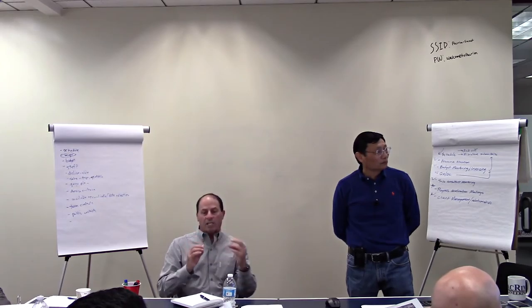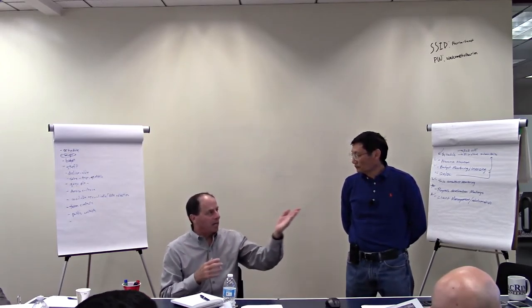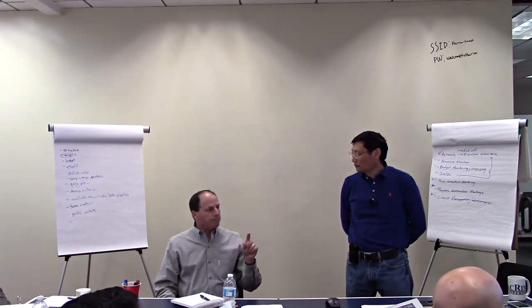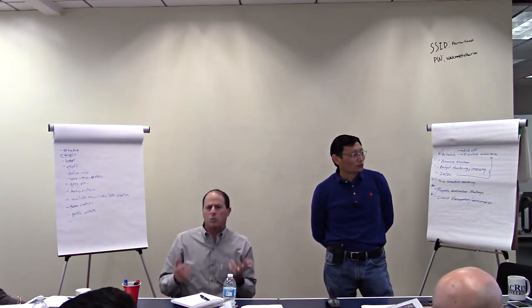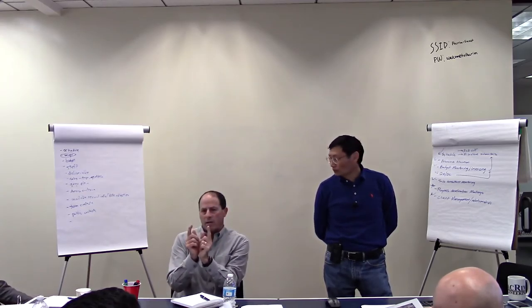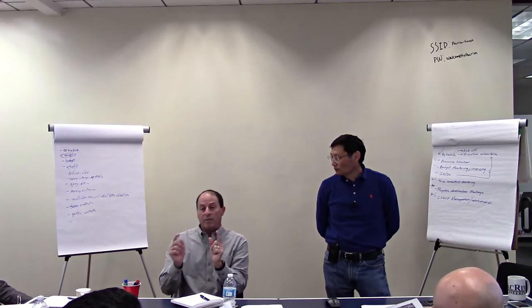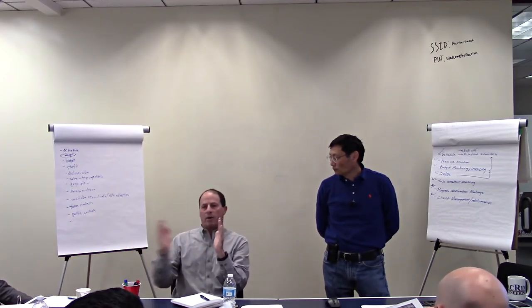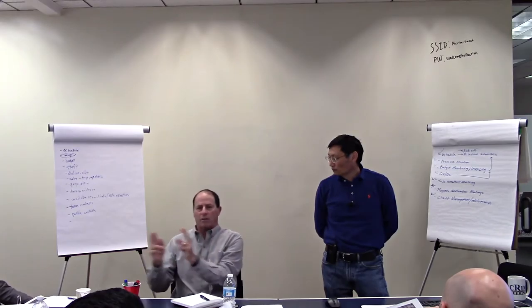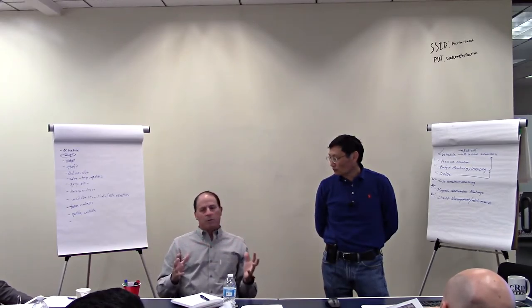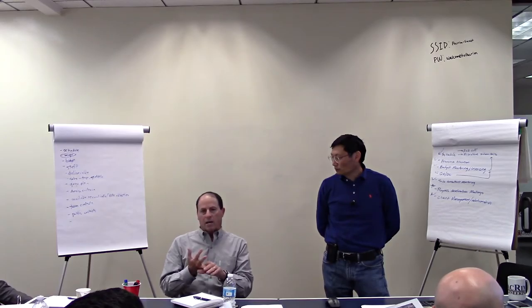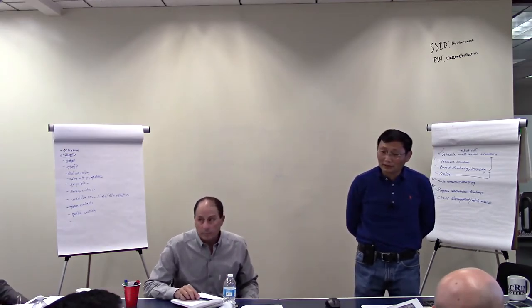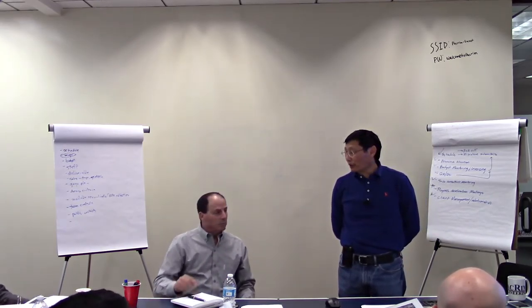And so you might notice in this schedule there are some blue bars that are floating in space. That raises a flag to me. Like that one up near the top, that doesn't precede anything, because I don't see an arrow going off of it anywhere. I always want to have things linked in time. In that case it's pretty obvious, execute contract. But anything else further down, master meeting, master planning, and there's nothing at the end. What's the importance of that? Everything has to lead to something else, even if it leads way down the road, and that's when you can identify the float. It says I really don't have to start that, and I can do that anywhere in there. But it starts to help shape what you have to do on your project.